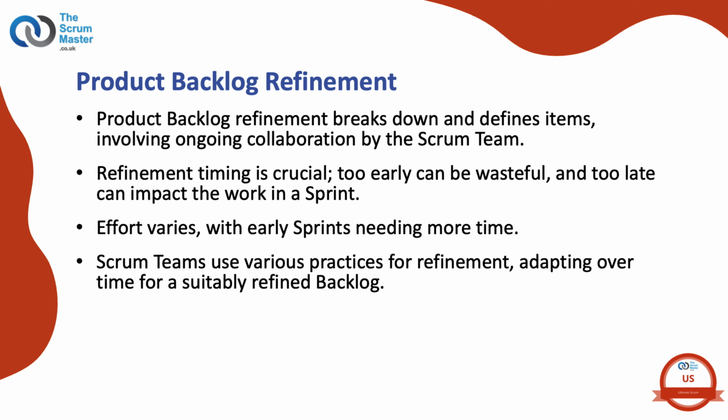Refining product backlog items to the right level at the right time is important. In a complex environment, it is difficult to predict what will be needed or how needs may change as more becomes known about the product. Refining too early could be a waste of time and effort. Refining too late or not refining at all could reduce the quality of the sprint planning event, and limit the ability of the developers to produce a done increment by the end of a sprint.